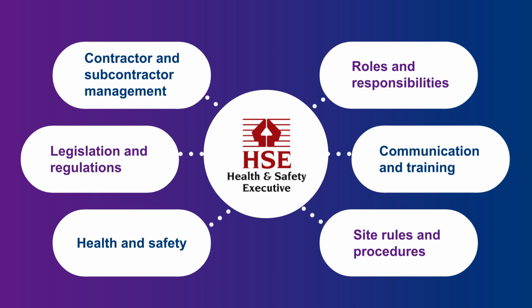A project-specific construction phase plan is required before any construction work begins. Working together and noting key points will assist in the planning and organisation of a project, ensuring that the work is carried out without risks to health and safety. It will also help to comply with CDM 2015.